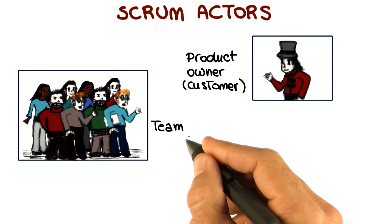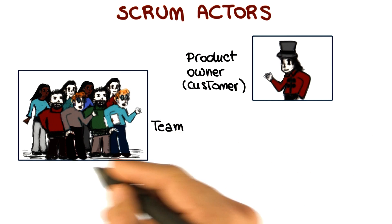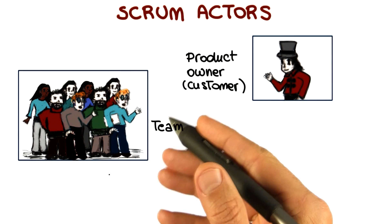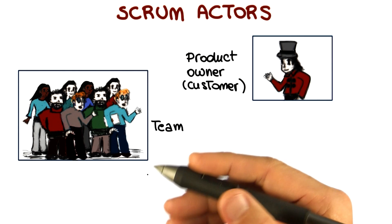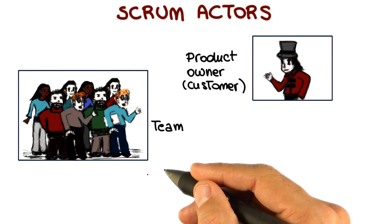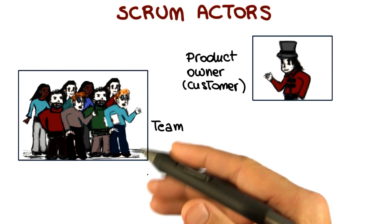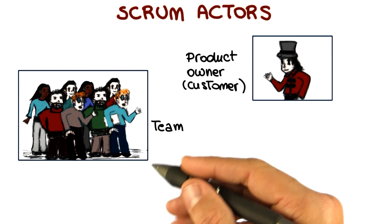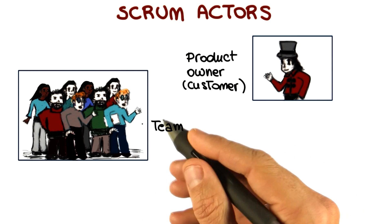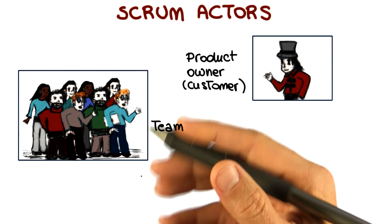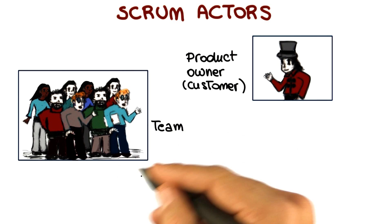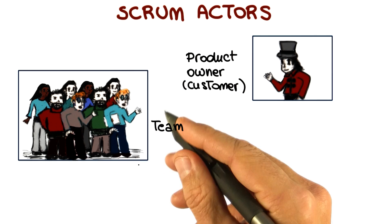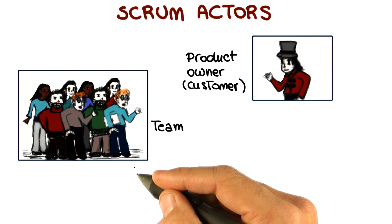The second actor is the team. The team is responsible for delivering shippable increments, to estimate the backlog items. It is normally self-organized, consists of four to nine people, and is what you would consider normally as the main development team in a project.